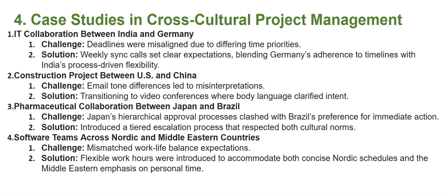We have case studies in cross cultural project management. IT collaboration between India and Germany: the challenge here was that deadlines were misaligned due to differing time priorities. Solution resolution for that is weekly sync calls, setting clear expectations, blending Germany's adherence to timelines with India's process driven flexibility. And here we are reflecting the idea of polychronic and monochronic cultures.